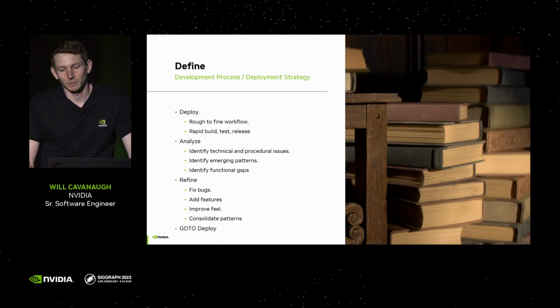We also decided to adopt a fast iterative development process, deploying APIs and tools as early as possible, and testing with real data as much as we could. This meant de-risking, developing, and proving out concepts and APIs on a dedicated test show, as well as deploying early versions of our workflows and tools into real shows. We targeted high-return portions of the pipeline first, such as asset packaging, and rolled their APIs and tools into production separately from the rest of the pipeline.